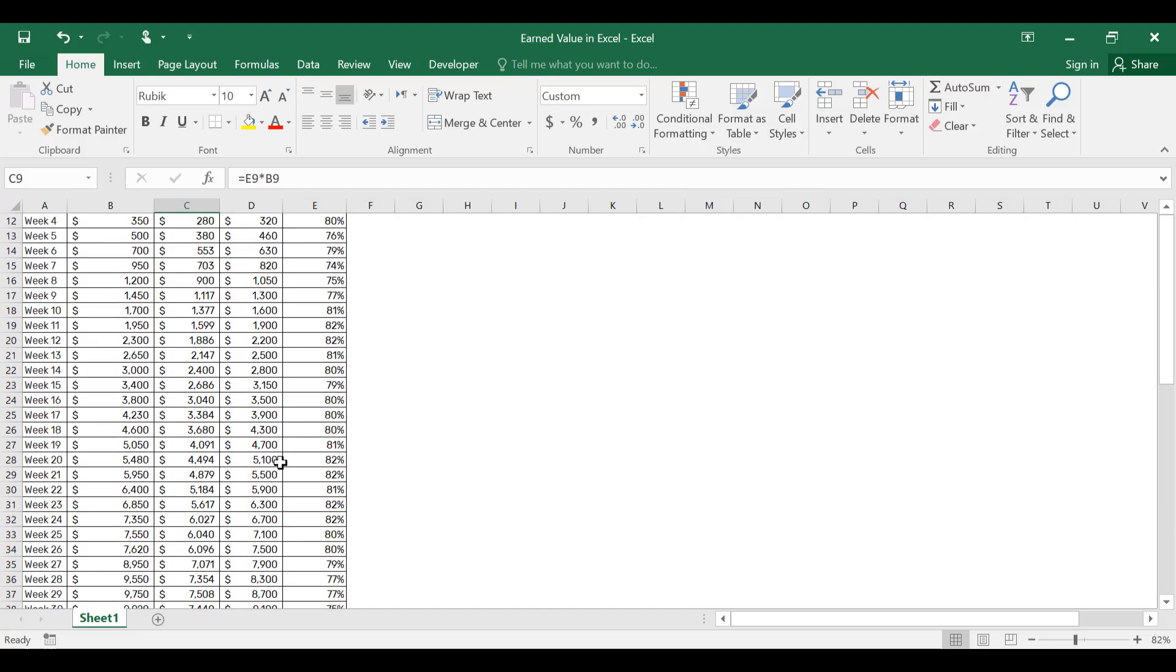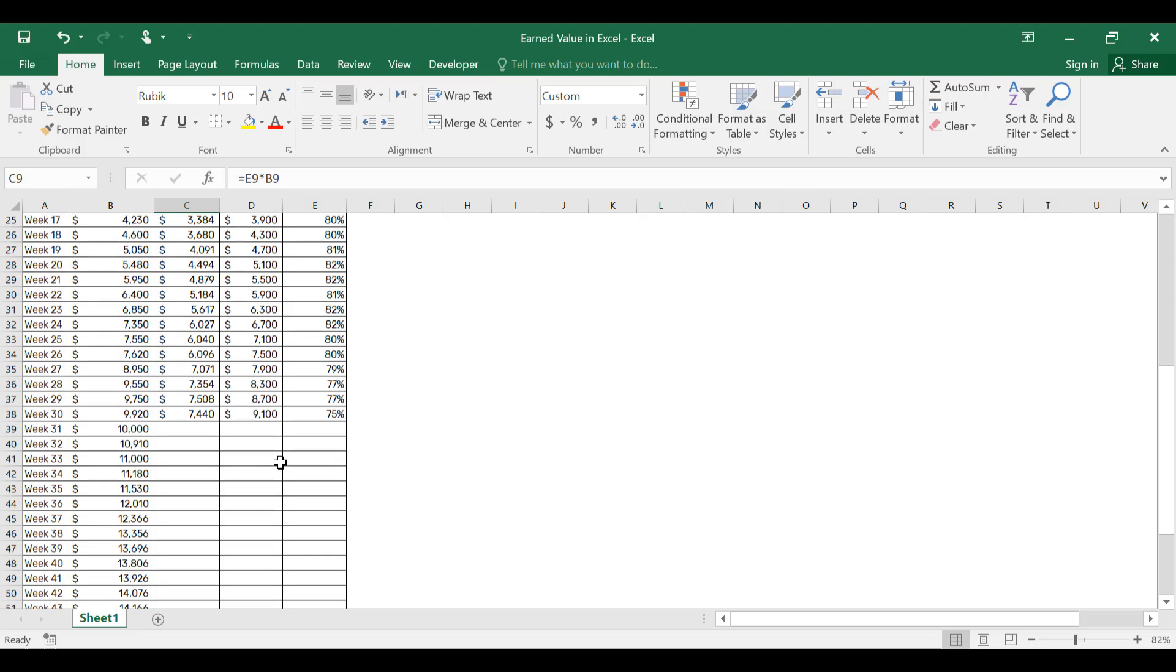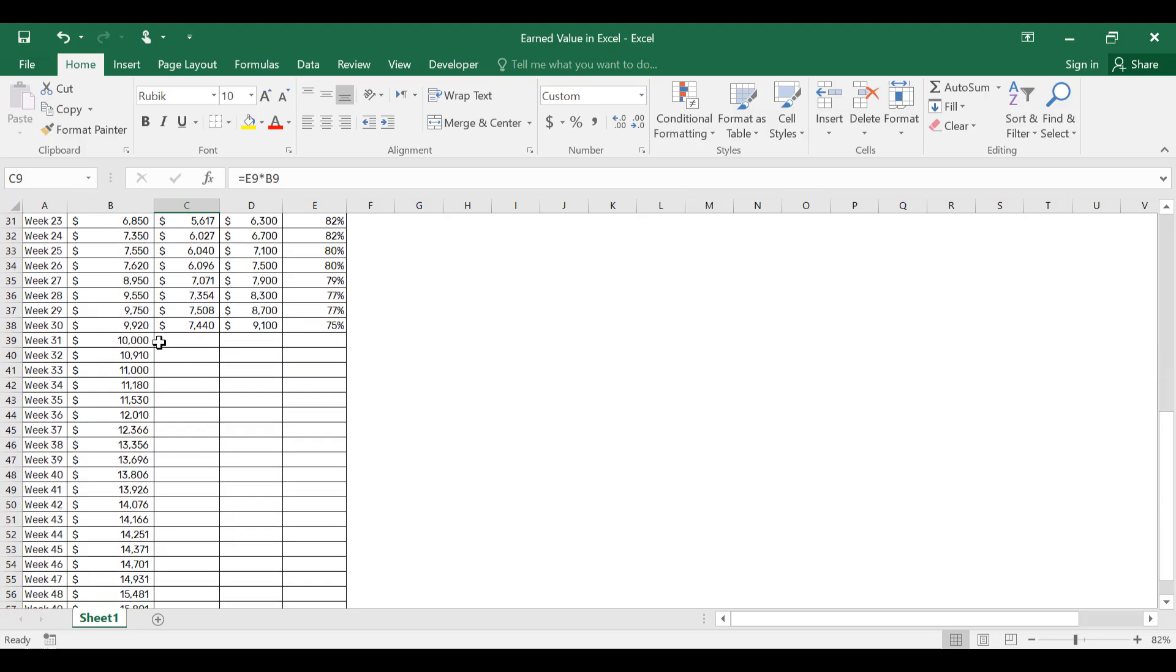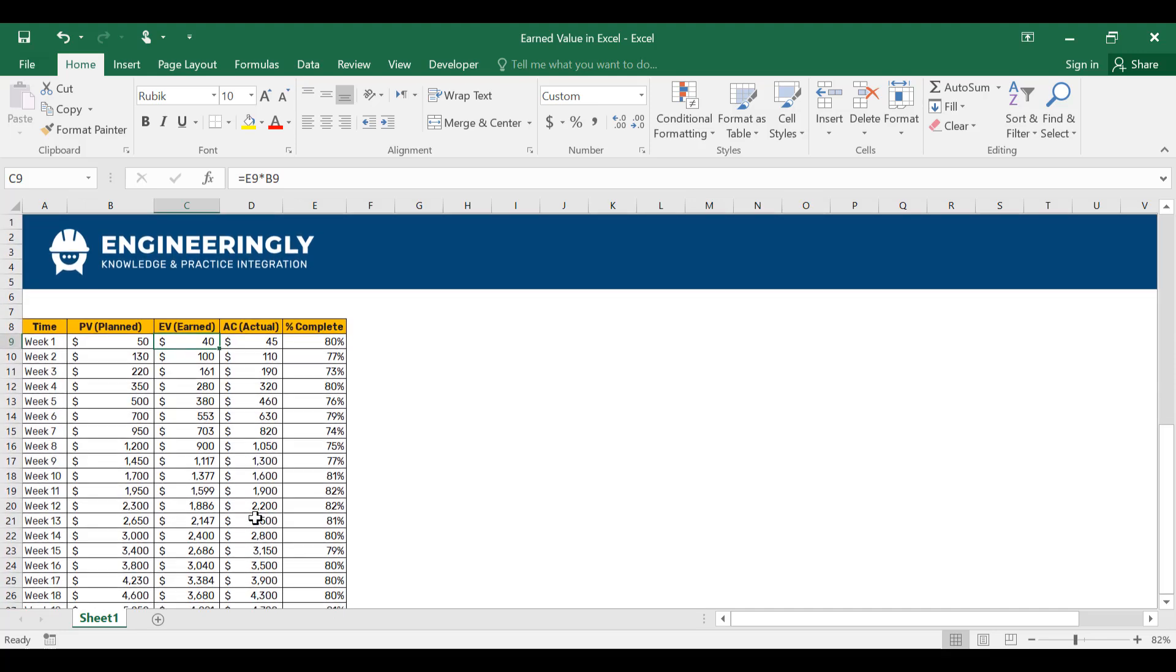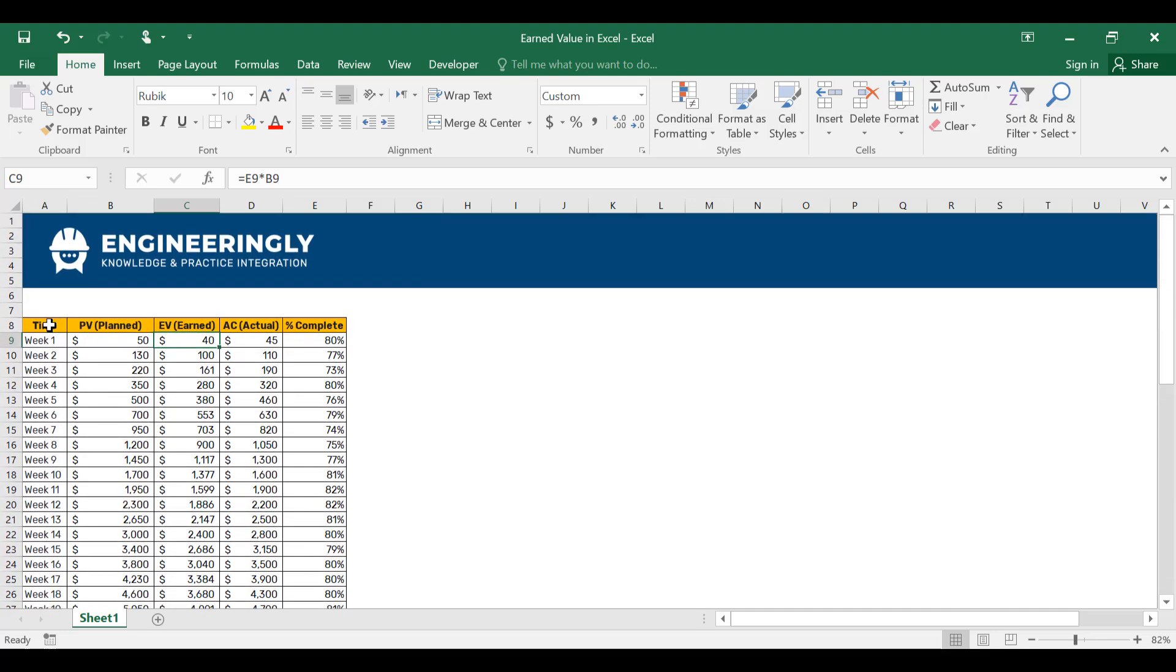And for the dates for which we don't have the data yet, or the future dates—for example, week 31 is a future week and we don't have any type of data—instead of leaving zeros here, make sure to leave them blank.